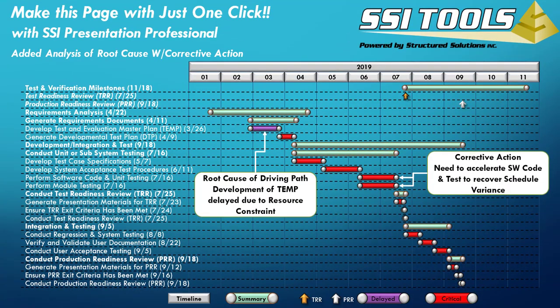I made this PowerPoint page using our Presentation Professional tool. It's a great way to put the result of a driving path analysis into a report for your team or your customer. You can also add notes to the analysis showing the root cause driver of a delayed program event, and notes describing the corrective action measures the team is implementing to get back on schedule. Presentation Professional is an SSI Tools add-in for PowerPoint. If you have it as well as our Microsoft Project Tools, look for additional videos on our YouTube channel or sign up for training.